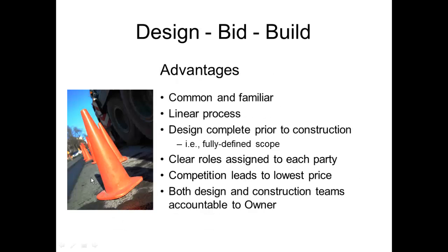The advantages of design, bid, and build: it's common, it's familiar, people know how to work it. It is a linear process. The design is complete prior to construction. We've tried to anticipate everything we possibly can in this project, and we fully defined the scope. Clear roles are assigned to each party. Competition leads to the lowest price. Both design and construction teams are accountable to the owner.